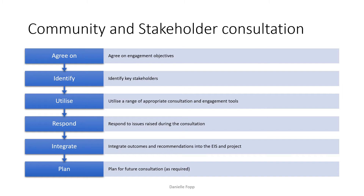You also need to utilise a range of appropriate consultation and engagement tools, which we will be looking into going forwards. Following the consultation, it's really important that you then respond to issues raised during it. It's not enough to agree on the engagement, identify the stakeholders, talk at them and not care. We need to be utilising these communication and engagement tools to understand what the stakeholder issues are and respond to them — responding is key. We will then be integrating the outcomes and recommendations into the EIS and project.